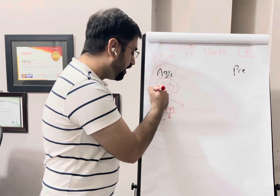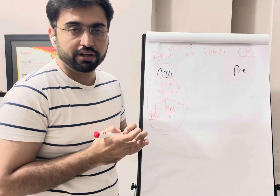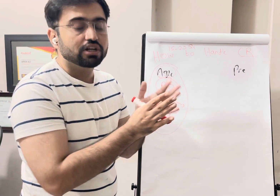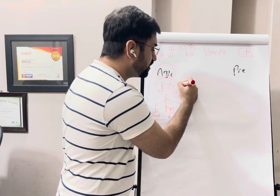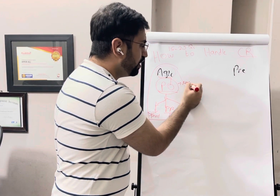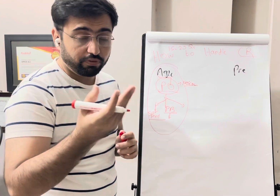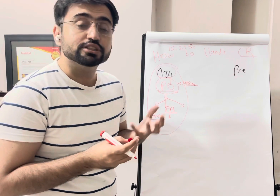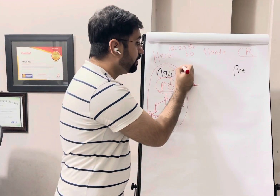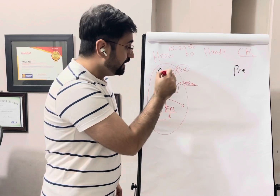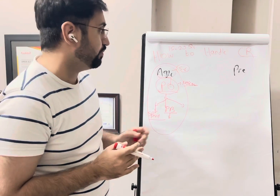That's how you handle a change request in agile: the change goes to the product owner, who prioritizes the product backlog according to the priority of the change. Priority is set with the help of the customer using MoSCoW — Must have, Should have, Could have, Would likely have. Recently, Fahad recorded his PMP exam experience interview and mentioned there were more than five to six questions about handling change in agile in different ways, so this is very important.